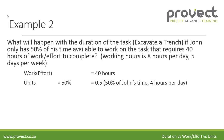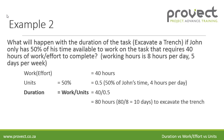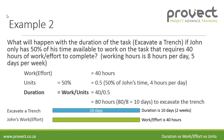The duration equals work divided by units: 40 divided by 0.5 equals 80 hours. Eighty hours divided by eight is 10 days. So it will take John 10 days to excavate the trench — compared to example one where, at 100% of his time, it took 40 hours or five days. So to excavate the trench will take 10 days, that is two weeks, and the effort is still 40 hours.